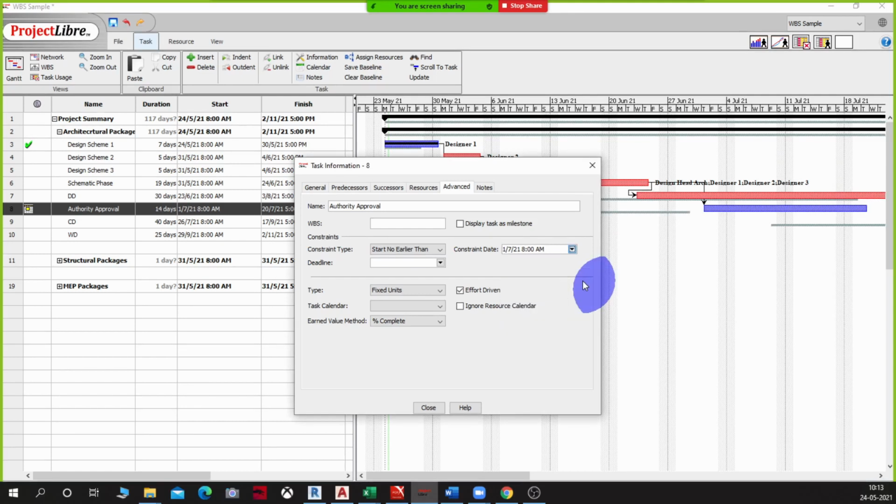That's when our lockdown ends then. So nobody is available in the BBMP office to sign until then. By default it was 24th of June, but I have now made it mandatory to move to 1st of July because I presume that that is the date when people will be available to take up that activity, the approval activity.